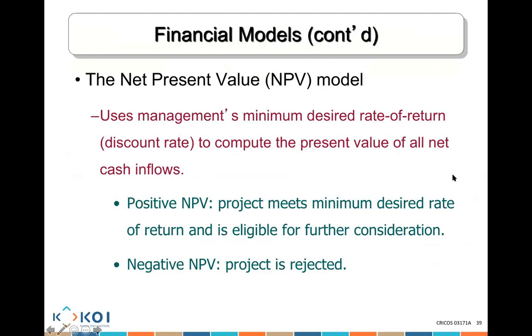Next one is net present value. Net present value doesn't simply want to know how much money you're going to get per year. Net present value wants to know: if you get $100 next year, how much is that $100 really worth in today's money? Is it really $100 or is it less? So you need to calculate it. If I was to invest $1 million today, in 10 years that $1 million is actually worth much less than what it's worth at the moment. So with this calculation, you want to ensure you select the project that will provide a positive net present value, and anything that gives you a negative net present value is going to be rejected. By the way, I might give you some examples of the payback method. Net present value is a bit more complicated to calculate.